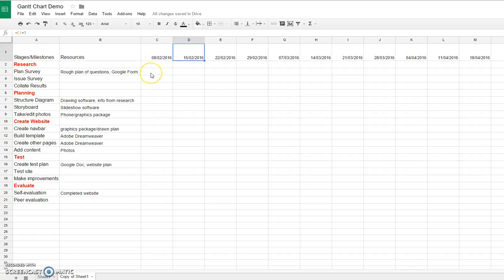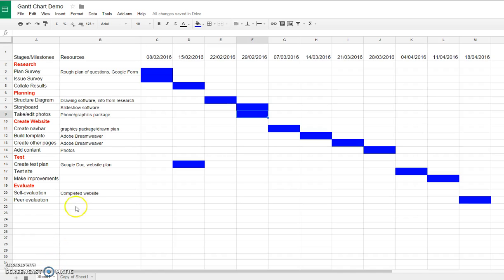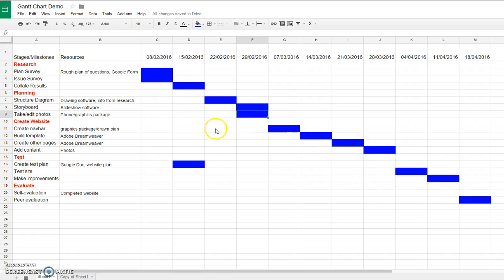Let's just go back and look at the original for a minute, and you can see what I've thought of. You notice that the shape of your Gantt chart kind of goes down, almost as if it's like a flight of stairs. That's logical, because there's a lot of tasks that you can't start until the previous task has finished.